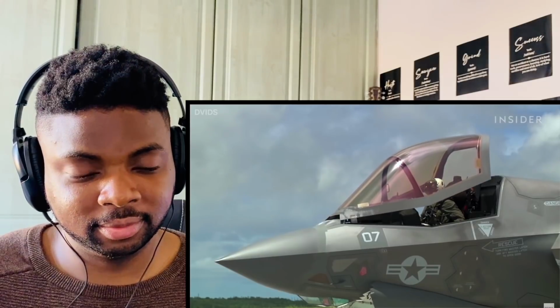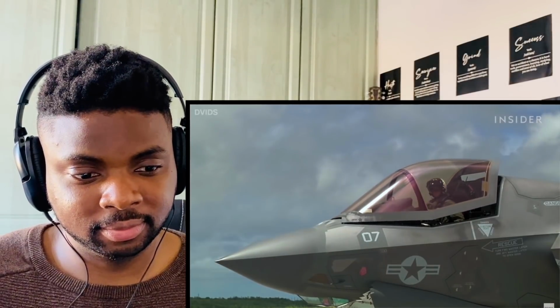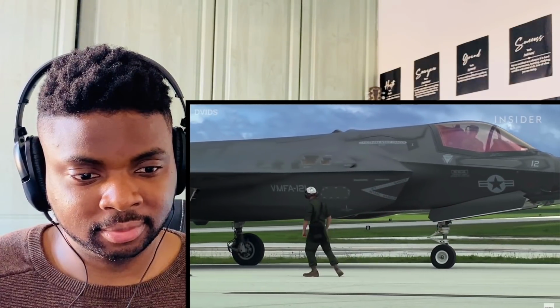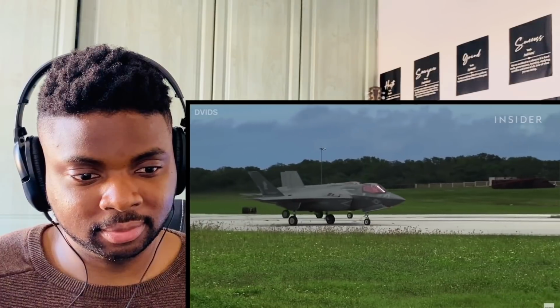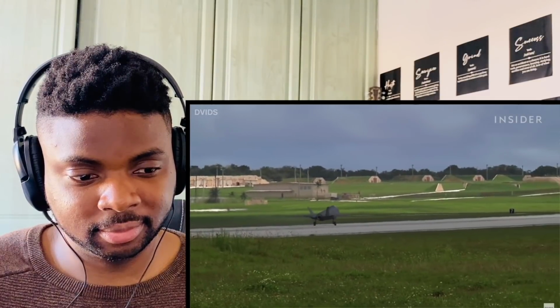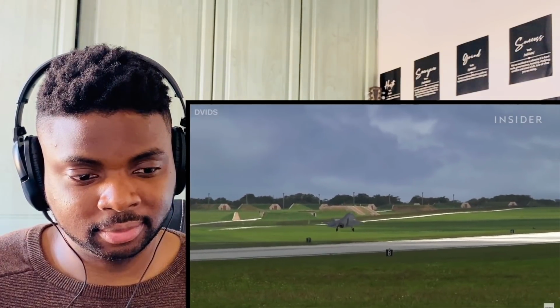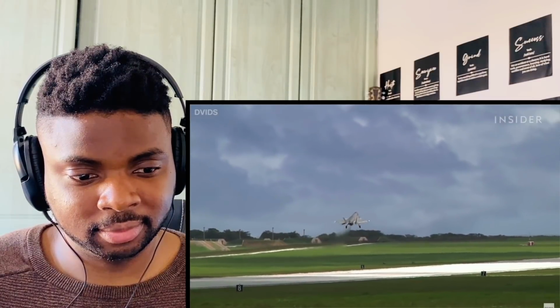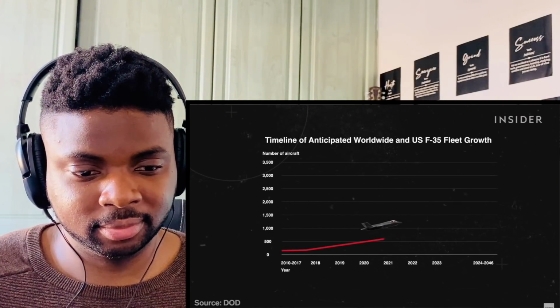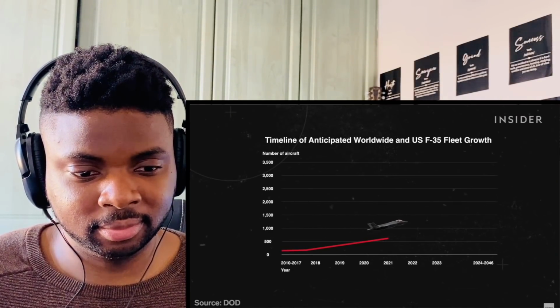Wow. It was part of the mess Bogdan inherited, because back in 2006, the DoD decided to enter production before testing showed acceptable performance. We were going to take all these new technologies that were not very mature, and we were going to integrate them in one big bang on the airplane and basically hope that it worked. The problem there is if any one of those technologies is not mature or doesn't work, it holds up the entire program.